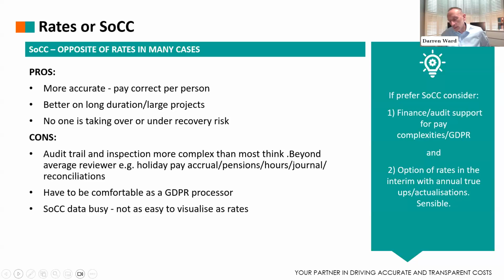Yeah. The other point I'd highlight as well, and I've seen this in practice, is that if you go to a schedule of rates, there's a risk that the contractor will include a recovery of profit and overheads within the rate.